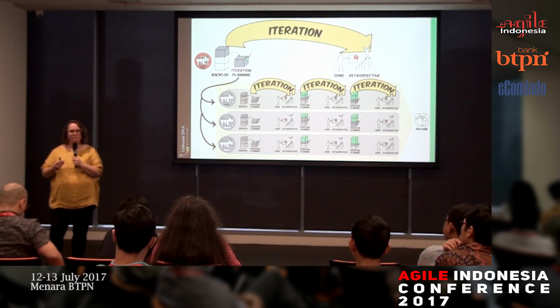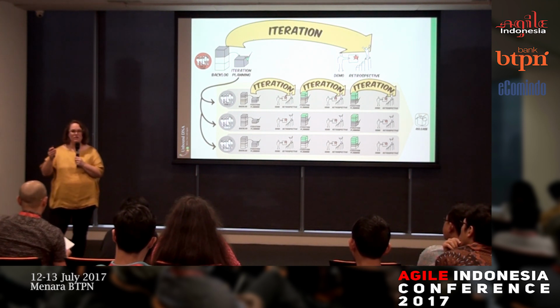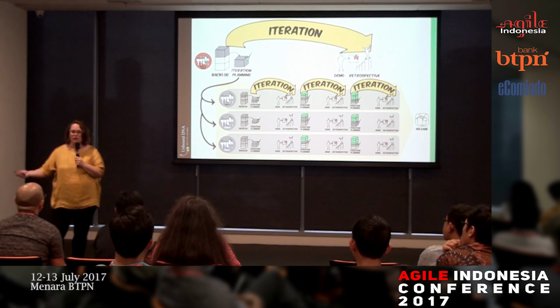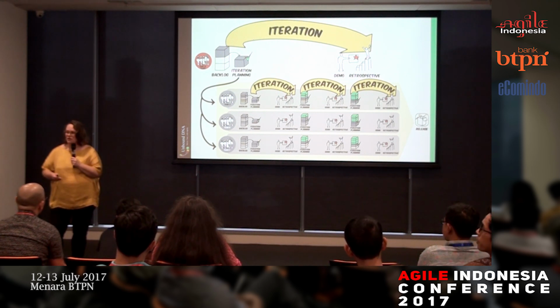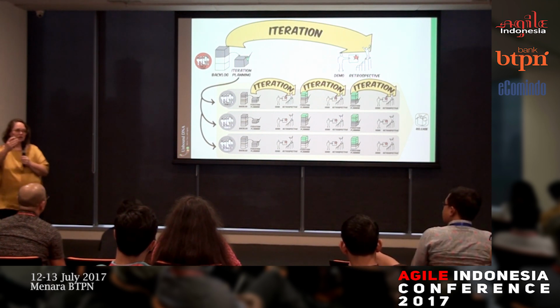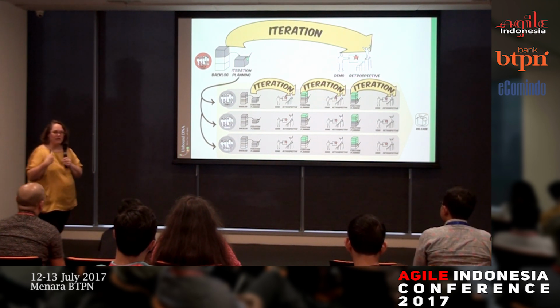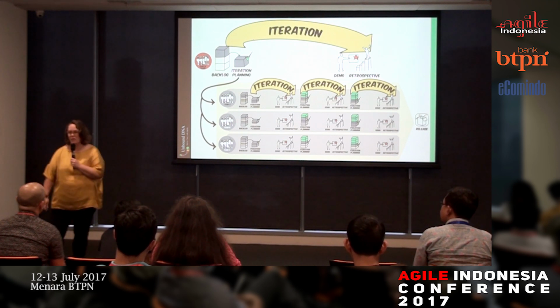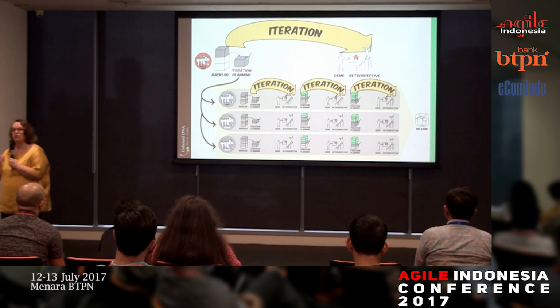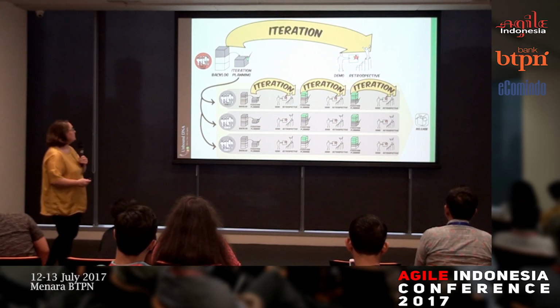Every 6 weeks as a leadership cell, we would get together and we would do our own version of Scrum. We would do backlog prioritization so that it would go into the teams underneath us. We would also do our own retrospectives, our own grooming, our own stand-ups. But many of those ceremonies also included the team members themselves. So this concept of a 2-step process is also quite a very common pattern. And you commonly see this in something like SAFe as it does what's called a program increment through 6 iterations.